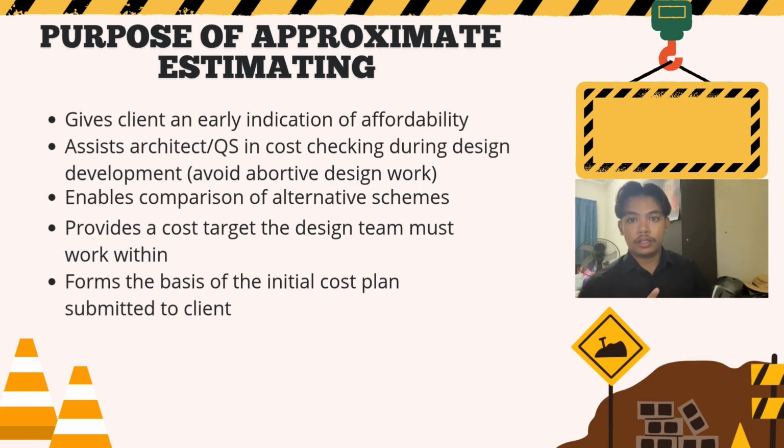Third, it allows the design team to compare alternative schemes, for example choosing between a steel frame or a concrete frame structure. Fourth, it sets a cost target that the whole design team has to work within, and finally it forms the basis of the initial cost plan that gets submitted to the client.